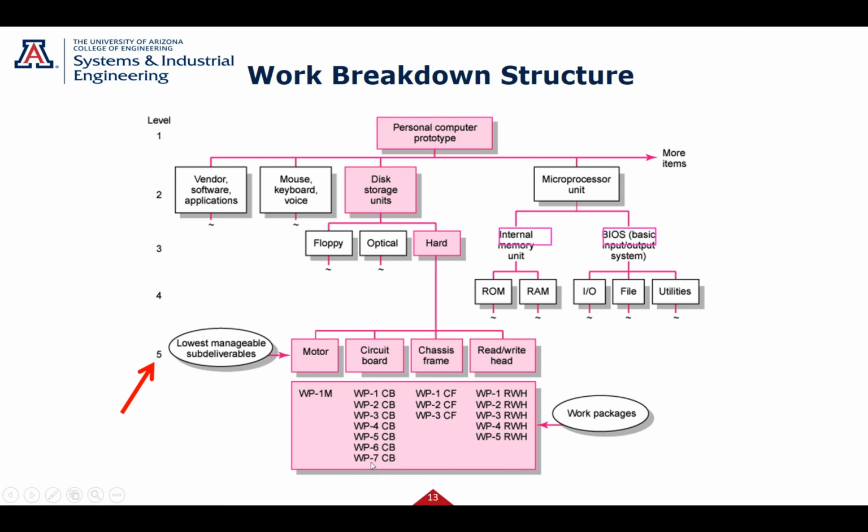The frame might be designing the frame, doing a structural analysis of the frame, building the frame up. So you're now breaking it down into what are the things I need to do to get my circuit board or my chassis or my read-write head, so whatever. And those are what's called your work packages. Those are what you're going to assign people to, because they may be the same person, they may be different people doing these tasks.